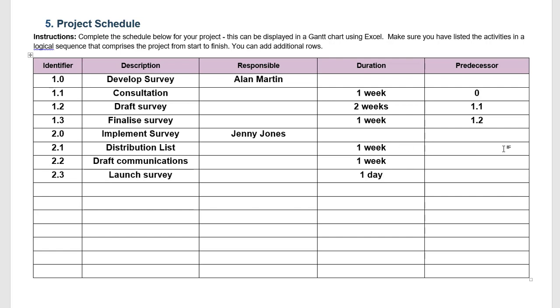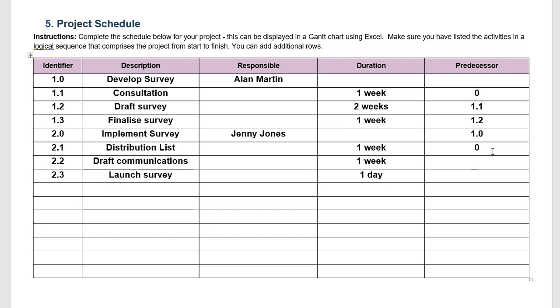Once again we consider what might come before what. So implementing the survey is definitely dependent on all of 1.0. We can't actually implement the survey if we haven't finalized it for example. The distribution list, that would potentially not be dependent on anything. In fact we could possibly start working on that on day one because we know that our scope of work is to every employee. So early on we need to know that that distribution list needs to be completely up to date.